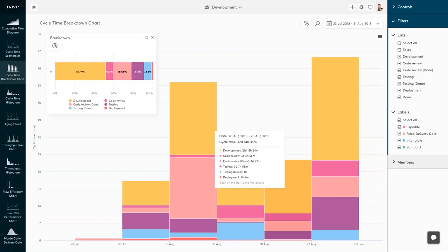To optimize your workflow performance, you need to break your delivery times down into smaller pieces and evaluate improvement opportunities. This is best achieved with the cycle time breakdown chart. The diagram displays the cycle times of your completed tasks split by status. By analyzing the different sections on the bars, you can assess how the time spent in each status affects the overall time needed to finish work. The most important information to get from this chart is how the data changes over time as an indicator of continuous improvement. If the longest sections are going down, your improvement efforts are paying off; if cycle times are going up, take a step back and analyze the reasons.